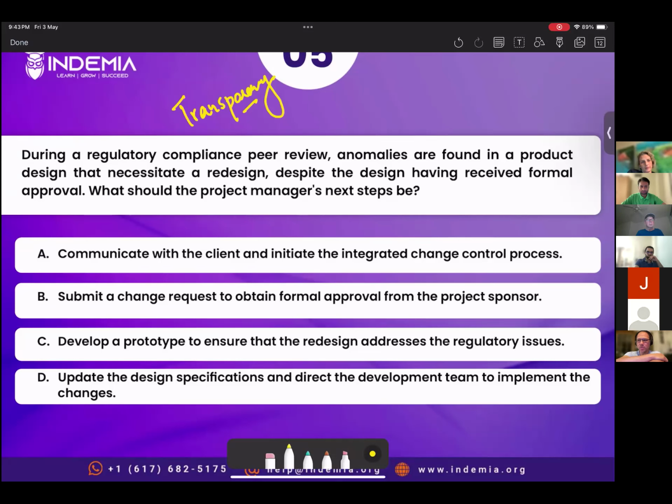So the question really came down to who do we update. Do we update the client or do we update the project sponsor? A lot like what Mary said, transparency, and ultimately the client. The design has been approved formally, so the client is well aware of what the design should be. So before changing it, we make the client aware that anomalies were found when we were doing the compliance review, and let him know that we have to change some things that he might not be expecting, and then from there we will initiate the integrated change process.